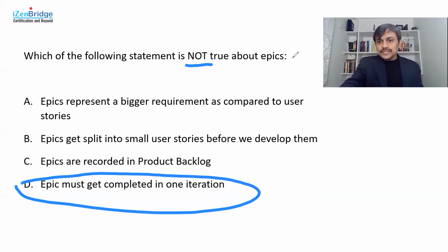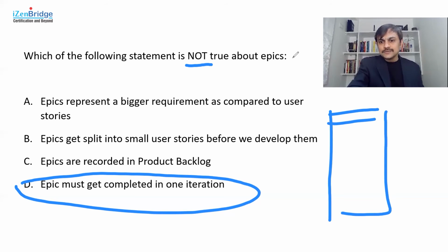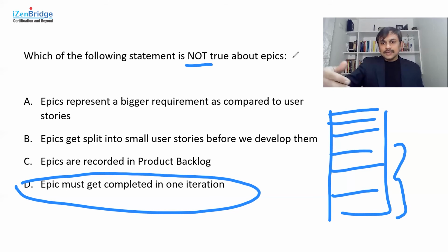Usually you see the description of a product backlog where there are items which are small, and as you go down, you start seeing the large size. The depiction represents the items which are not yet a priority. The whole idea of the agile way of working with requirements is progressive elaboration. We should not be elaborating things in advance. We should do it just in time, because we are discovering and learning about the requirement incrementally.